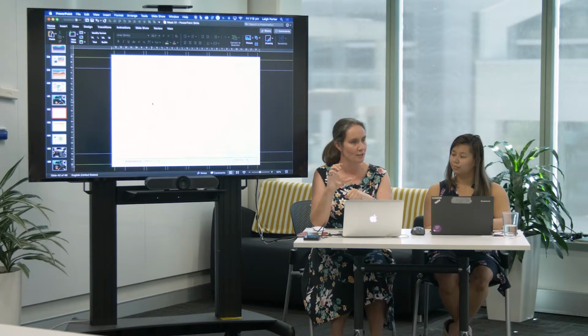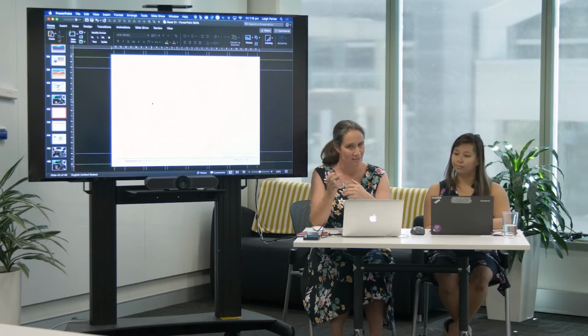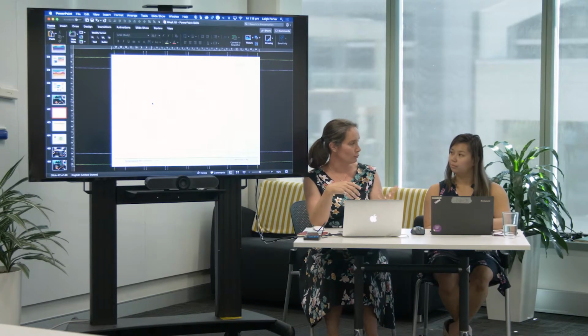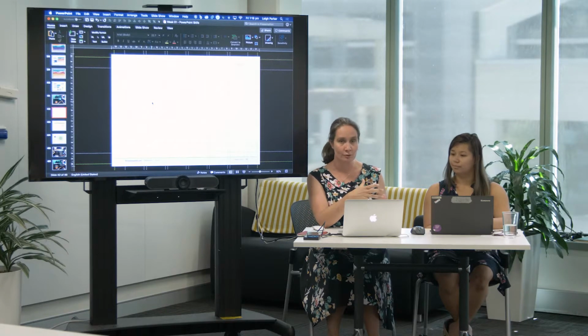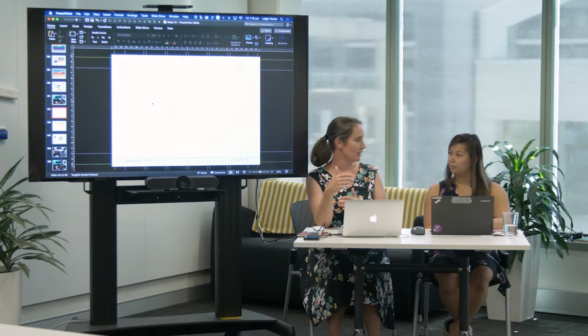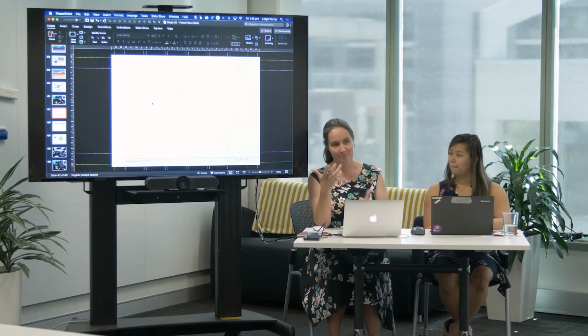So it would be more around the principles and some alternate text in a couple of places. Whereas if it's going to be distributed more broadly, a day of time to go through a 20-page slide deck might be good in the first instance. Do we need a day plus a day for testing?